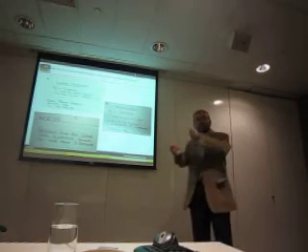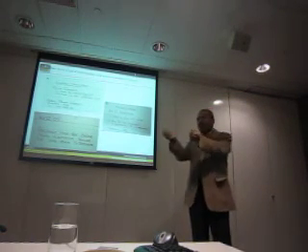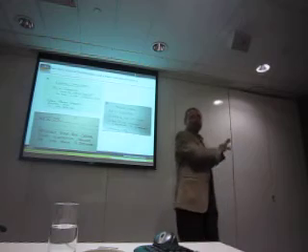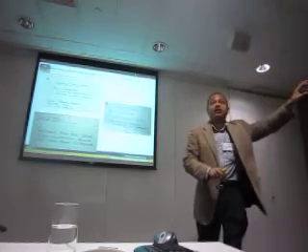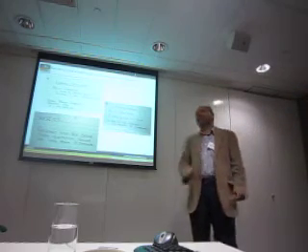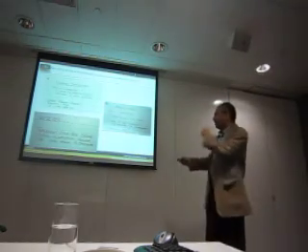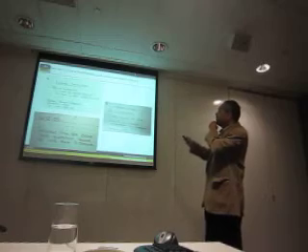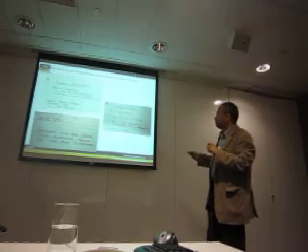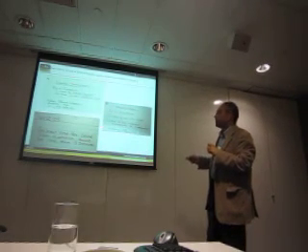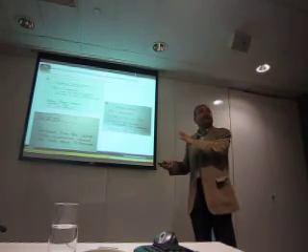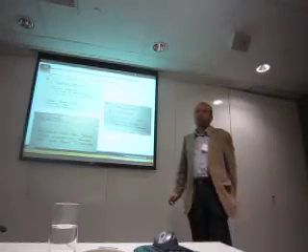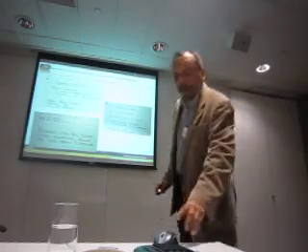Then they are prioritized, and they are given red and yellow and green tags. Then they are moved from to do to being done to done, and then there is a 4th category called done, which I like the best. We also find that non-functional requirements, which don't fall into this format, like response time for online sales quotation, are also written in these user story formats. They are called features.